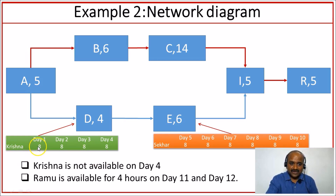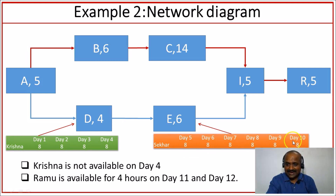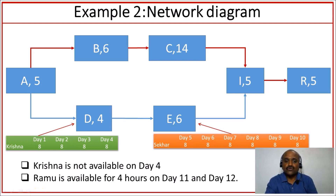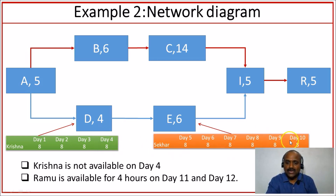Krishna is assigned for day 1, day 2, day 3, and day 4. Shaker is assigned for days 5 through 10 on Activity E. After planning, we came to know that Krishna is not available on day 4, meaning that part of the work cannot be done. Shaker is only available for 4 hours on day 11 and day 12. So let us see what happens with this technique called resource smoothing.